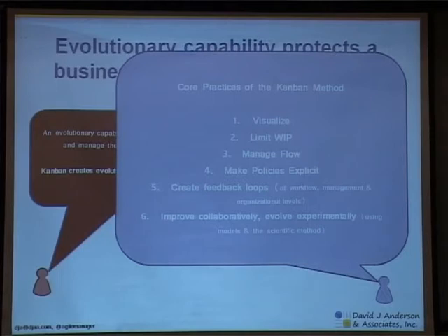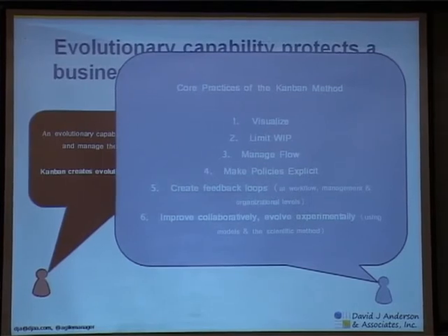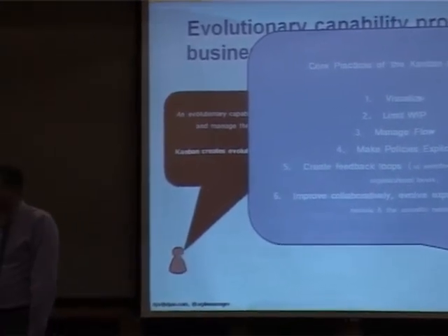Suddenly your security analyst is a one-person bottleneck, and that could be in a 400-person organization. And the senior executives are not aware of that policy, nor are they aware that one person in the whole organization is the constraining factor on getting things done. What if you were to do some analysis and come to the conclusion that not everything needs to be reviewed by the security analyst? Bifurcate the work so that some of it goes to the security analyst and others doesn't. Policy change eliminates the bottleneck. That's only possible if you make the policies explicit.